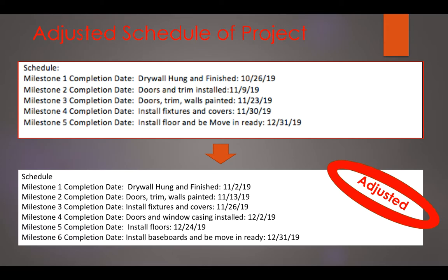And we're having to go back and retouch the paint in some areas, and it's taking a little more time, not necessarily a ton. We wanted to put the trim on the walls, tape the walls, and then paint them. So we had to switch that in the schedule and redefine how we were going to complete this task on time. That was what I was talking about when I said we had to do a road change. We had to redefine the schedule and the critical path to get to the end of the project.